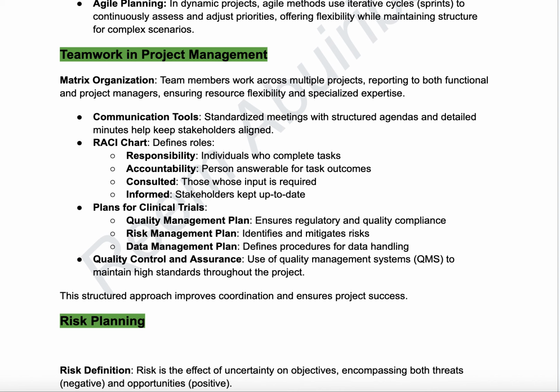RACI, where R is responsibility, A accountability, C consulted, I informed, defines the roles and responsibilities: individuals who complete the tasks; accountability, the person answerable for task outcome; consulted, those whose input is required; informed, the stakeholders kept up to date.